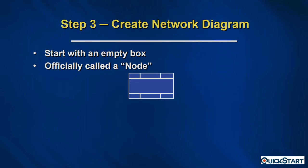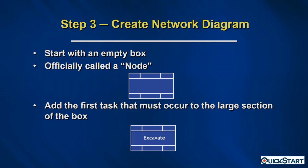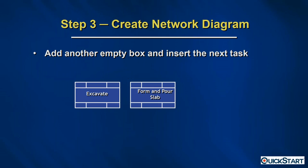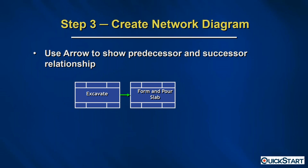Once tasks are identified, step three is to create a network diagram. We start with an empty box called a node. Once we have the node, we add the first task — the task name goes right in the center of that large section of the box. You can see we've got the task 'Excavate.' Then we add another box and insert the next task.